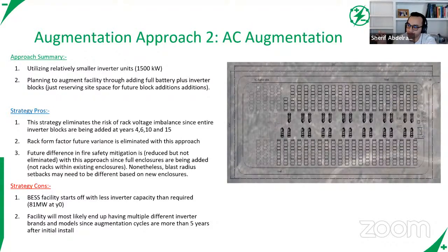The amount of capacity at year 0 has to match what you have your interconnection for. Other utilities may tell you it's fine, you just have these requirements from a SCADA standpoint, from a system design standpoint, so that their system impact study results aren't invalidated when you add more inverters in the future. So it'll just differ from an interconnection standpoint.